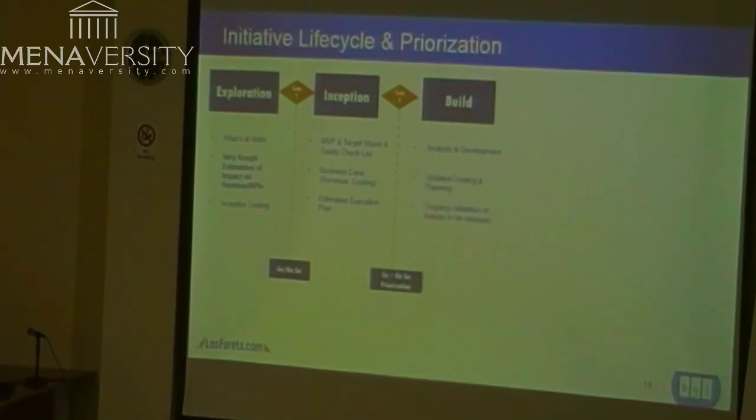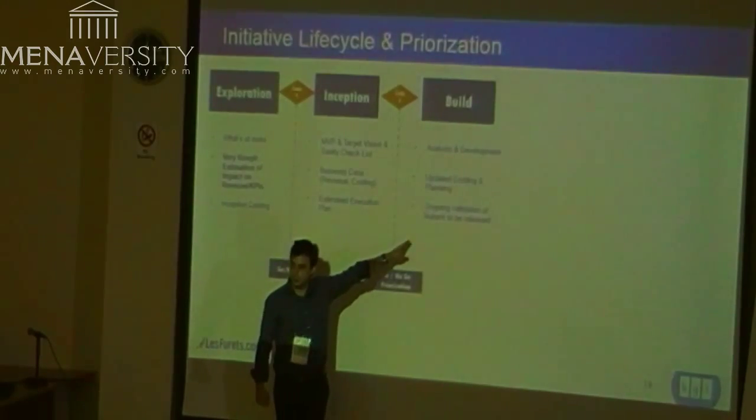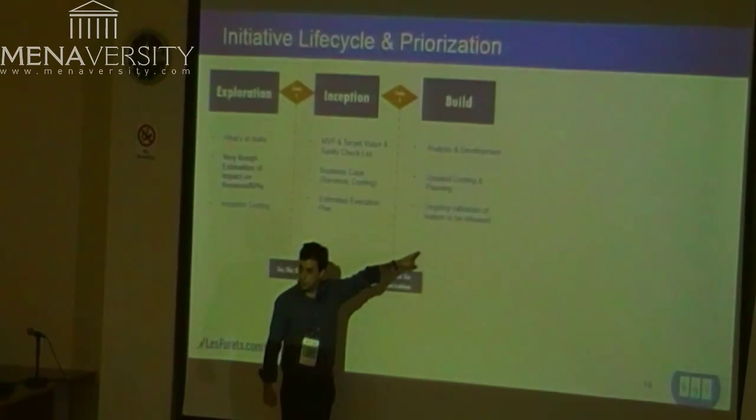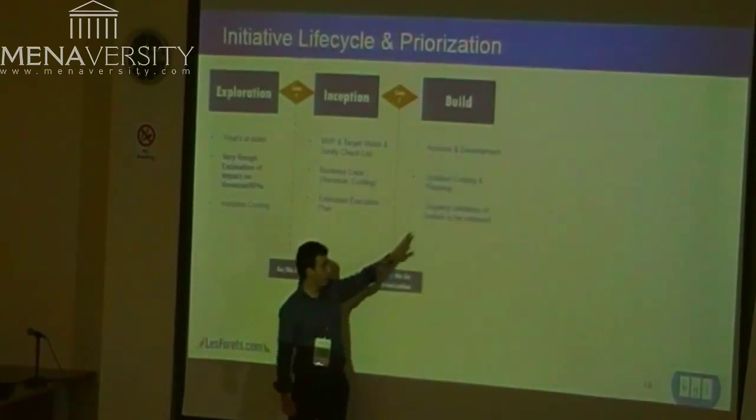And this is really where we have a clearer and more committed idea about how much a project is going to cost. Because let's face it, whatever we say here and here is going to be mostly bullshit, actually. Once the guys start coding and go into the real analysis, this is where we're going to know how much the project is going to cost. We have an estimation here, and we're going to refine it.